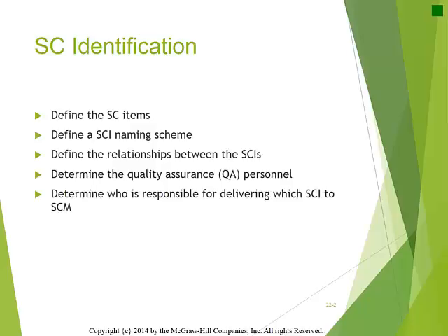The attributes and operations common to configuration items are an ID number, which is a unique ID to identify the CI, a name, which should indicate the type of configuration item, for instance, a use case or a sequence diagram. Document type should be indicated. These types could be planning, requirements, design, and so on. A document file should be specified, which is the path to where the document is stored. The author who created the configuration item should be stated.